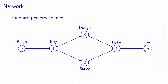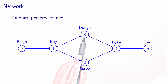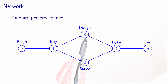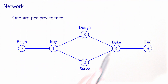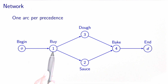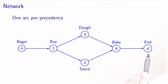We include an arc each time there is a precedence condition. To start making the sauce, buying the ingredients must be completed, so we have a corresponding arc. The same applies for the dough. To start baking the pizza, both tasks 2 and 3 must be completed, represented by two arrows. The origin node O must be a predecessor of every task — here it is a predecessor of the buy task — and symmetrically, node D must be a successor of all tasks, in this case a successor of bake.